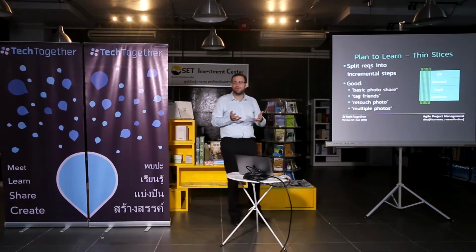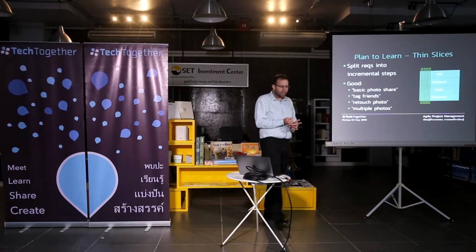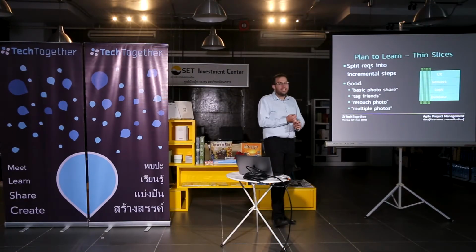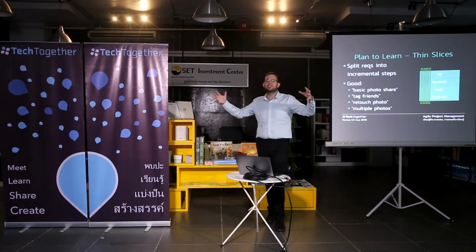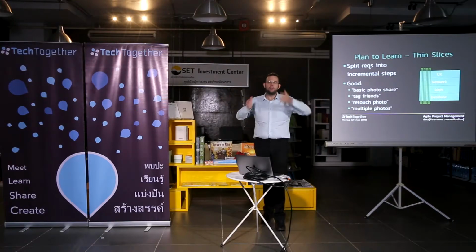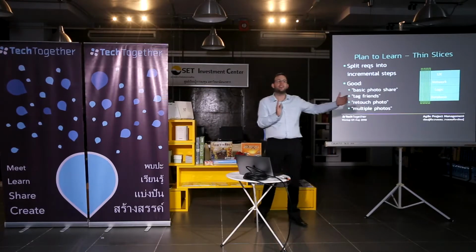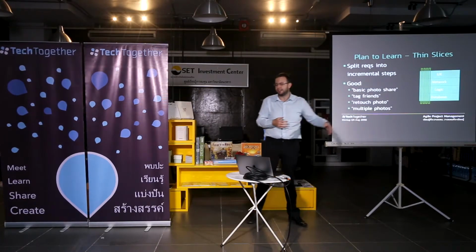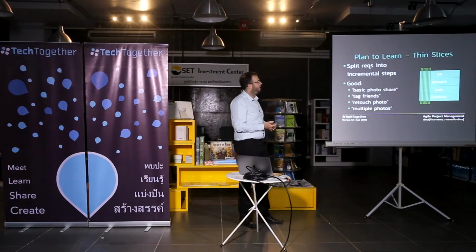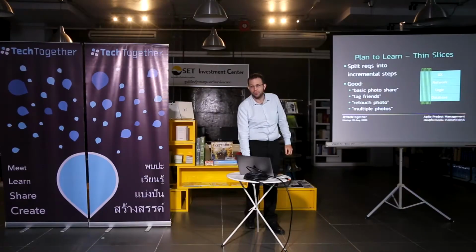Actually, I've got a whole load of reasons why to do this. At any point you can give up and you've still got value. You can prioritize the different tasks differently. So if you've got one big task, you might think this is urgent. If you cut it into 10 pieces, maybe 3 small pieces are urgent and the other 7 pieces, you do them later. I've got a whole list of, I have to check my slides. There's about 5 or 6 reasons why this actually helps you when you're planning.